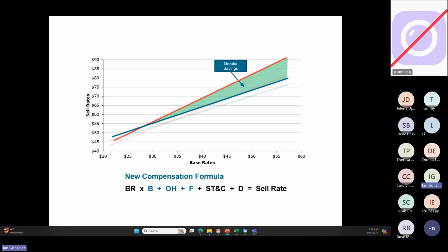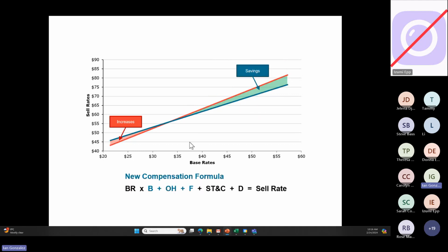And I've had in my experience no issue with asking them, can you please rewrite your formula so that your base rates, overheads, and profit are adders instead of multipliers. Many suppliers will think that we normally do that, but you can tell them just make it numerically the same, and you will see this phenomenon. Let me go back with my animation. When they do that, for the junior people, these components will be higher. That's the only way they can make money, because for the senior people, the rates will be lower. But they can engineer this to be exactly the same.